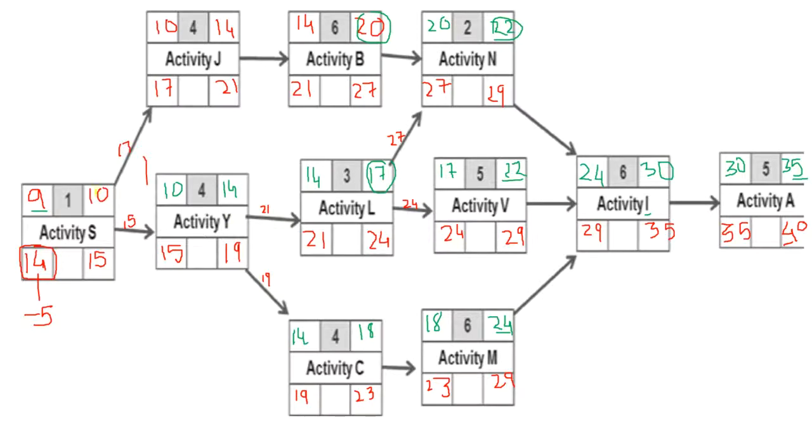So basically we have to make sure that the activities get delivered on time. We will be starting on day 9, so we are not starting too early, so that we do not incur huge financial penalties and interests, and our goal would be to finish by 35. But if things go wrong, we would have a buffer of 5 days to accommodate things if they do not go as per plan.